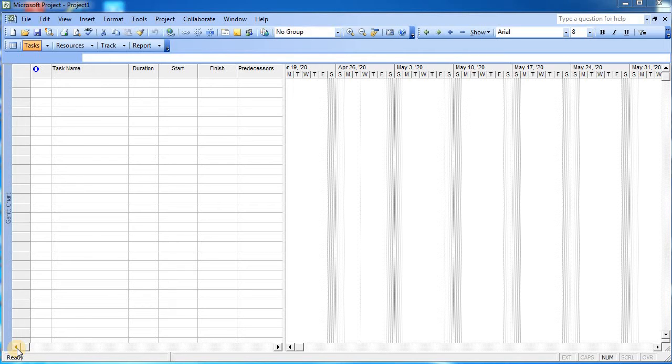structure. First we will understand the term work breakdown structure. Any particular project, maybe the construction of a particular house, consists of various activities that are written below it. If we want to divide the major construction work, we will write the name of the construction work at the first line, and then we will write the first step for doing the construction work. So basically we will divide the complete work into 2 parts: substructure work and superstructure work.